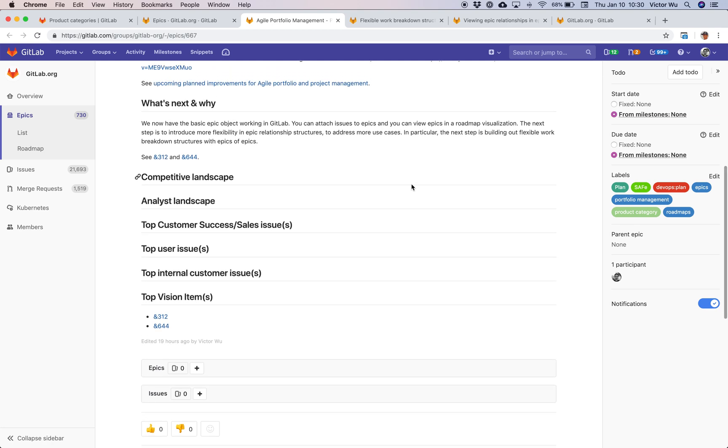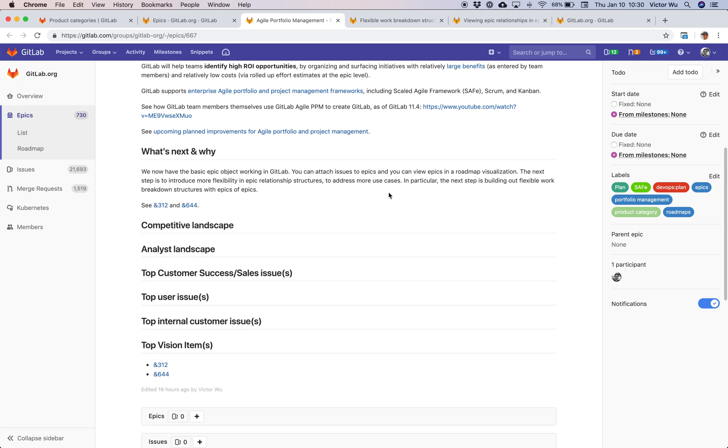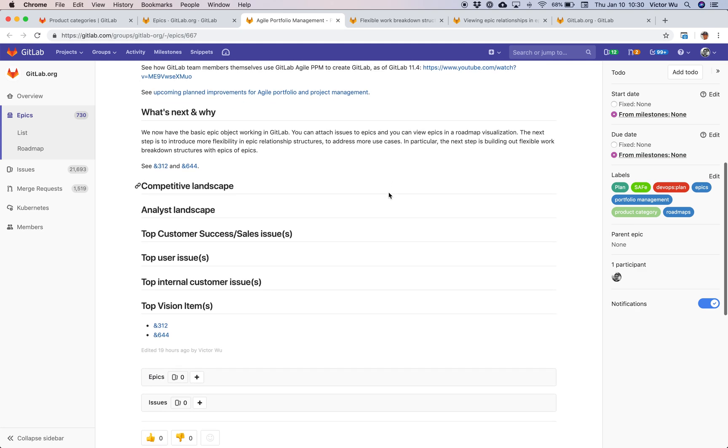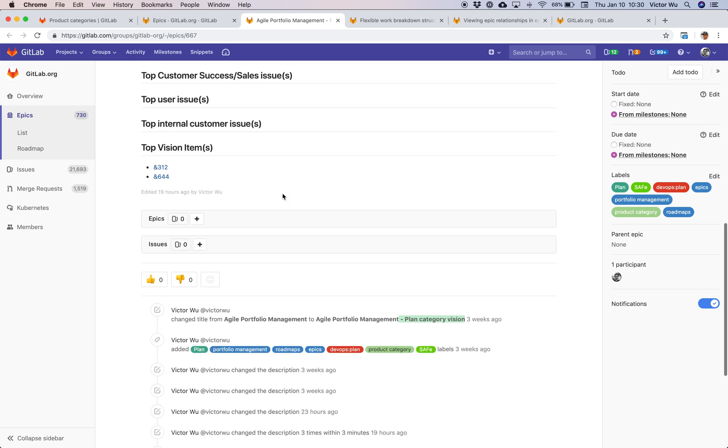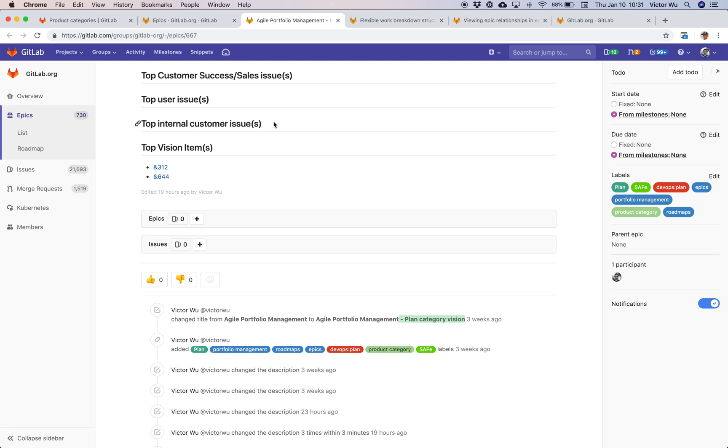Back to this Epic. This is an Epic you've seen and probably used already if you've been using GitLab. But one thing that might be different is there's a new category or section here called Epics. Before, we've always had issues that you can attach to a particular Epic. Now you can attach Epics to Epics. That's what we mean by child Epics. Essentially, you can attach Epics unto Epics or nested Epics or subepics, however you want to call them.